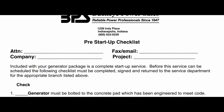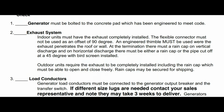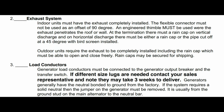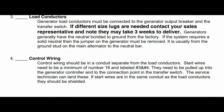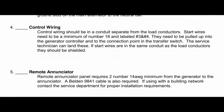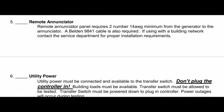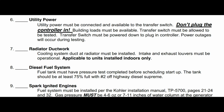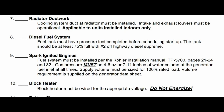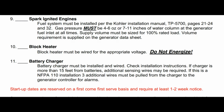In order to streamline the process of putting your new equipment into service after it has been installed, it is important to go through a checklist to confirm all the equipment required has been received prior to the technician's arrival at your site. Your experienced power service provider will provide a checklist to be completed and returned to their appropriate service office. Installation will not begin until it is confirmed the set arrived with no freight damage, loose connections, and was completely as ordered.